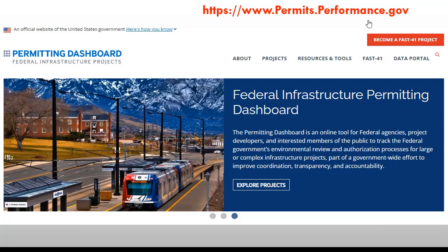Right. And for projects that are not required by law to be completed within 90 days, we still try to match that just to be consistent with those other laws. It may be more than 90 days depending on any circumstances that pop up, any last minute things that we didn't realize were going on, or congressional interest or something like that could slow down the process. But generally, we try to get things wrapped up and a permit decision made within that 90-day period.